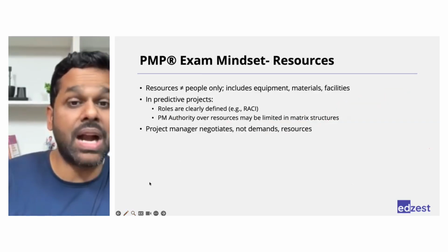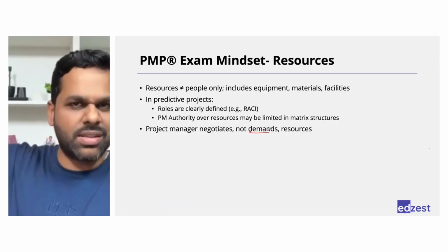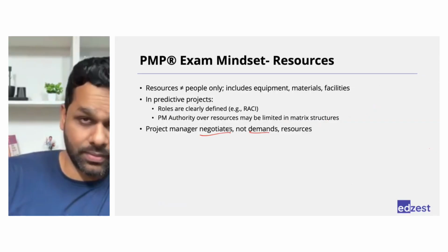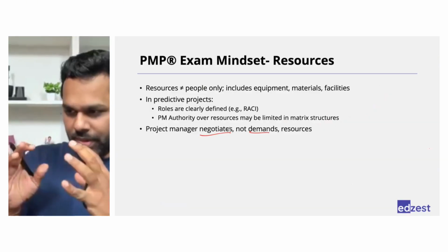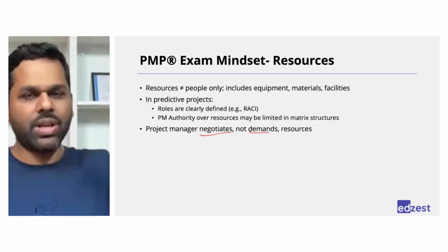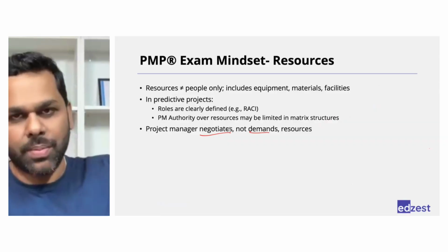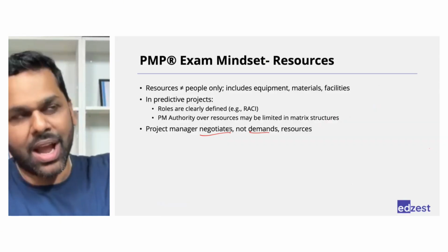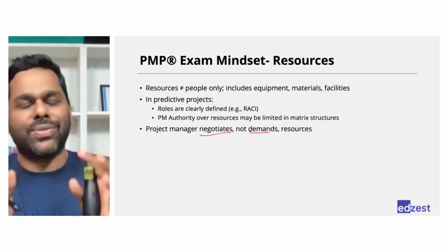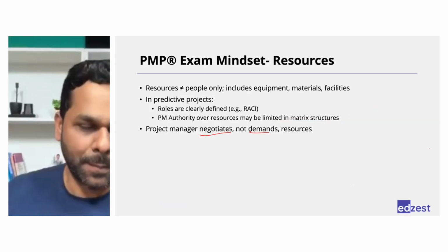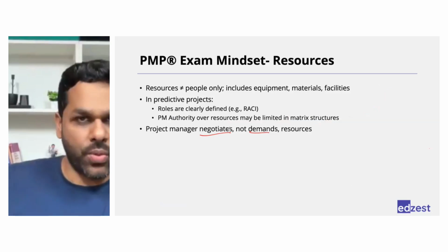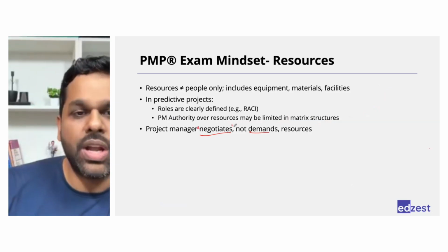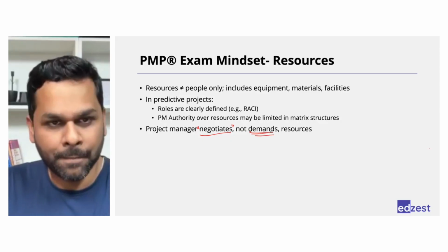Also, a project manager never demands a resource, saying, hey, this is what I need, give it to me. You always negotiate. Hey, this is my project. For this project, I need a designer. I know that you have a designer. I understand that you are busy, but if it does not hamper your work, can you afford to loan this resource to me for 7-8 days? They will say, no, we cannot do it. Then you discuss, hey, this is important, this and that. You negotiate. You never demand the resources.